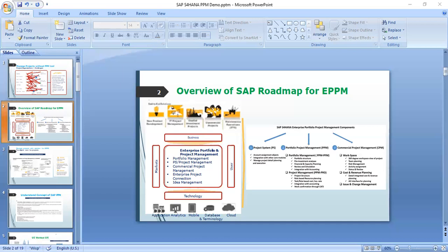First is your decision points and the stages. In the decision points, all your status levels are going to be maintained along with some sort of stages. As I said, it can be a combination of phase plus your decision points. The combination of these two is called a stage gate process. Once the first stage has been approved, then you can go with the second stage.